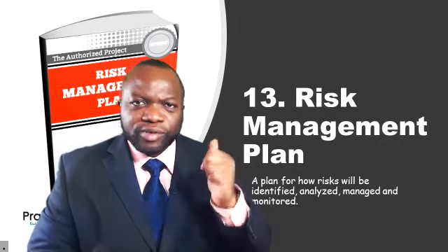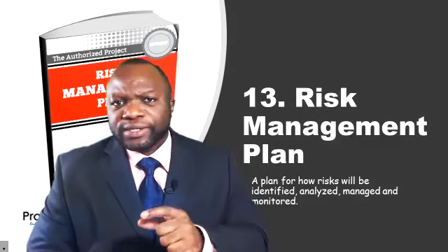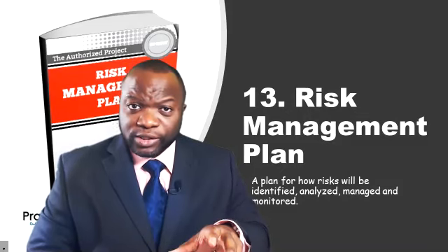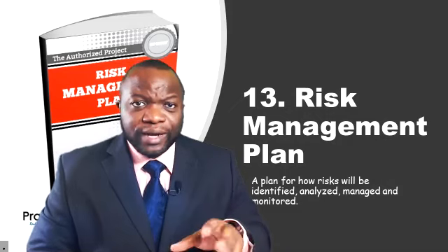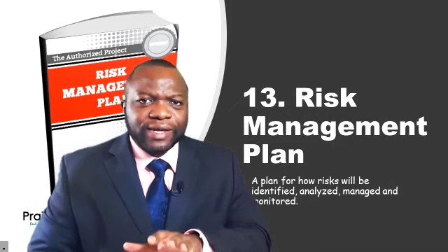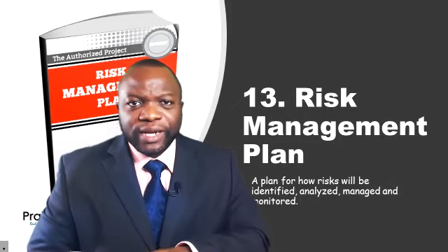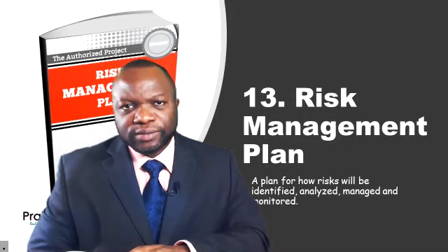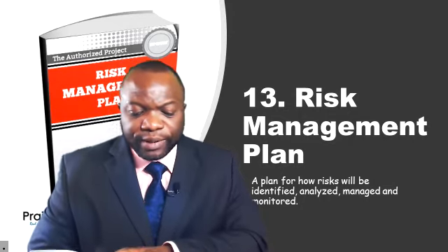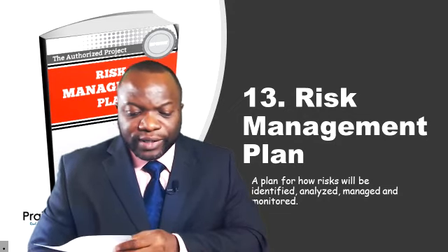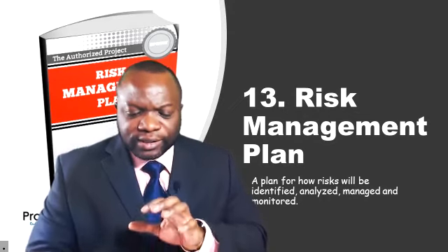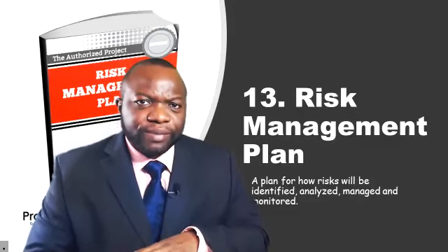So as you're coming out with your risk management plan, you need to consider any parts of scope, the scope baseline, schedule baseline, the scope management plan, the schedule management plan, the cost management plan, so on and so forth. Anything that exists in the project management plan should be considered. Now it says the methodology outlined in other project management plan components might influence the plan risk management process. Now, with that understood, let's take a look at what is in the risk management plan itself.